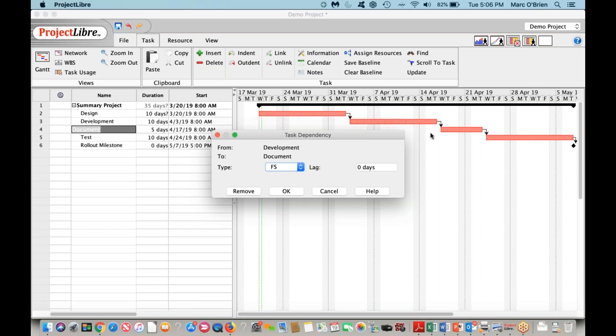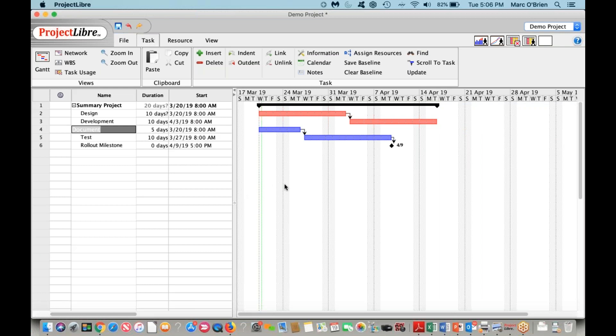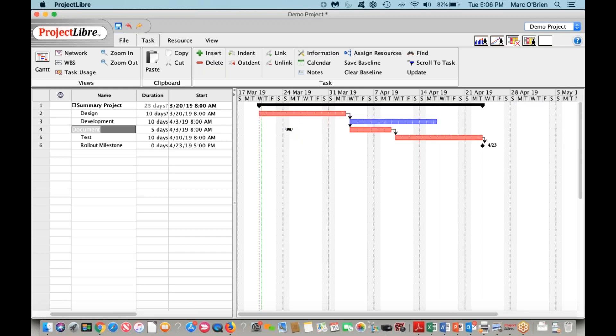What I'm going to do here is remove this link, and you can see the project change. What I'm going to say is design is a predecessor. If I click in that bar and right-click and then drag to document, you can see that I'm setting up that relationship. Now documentation and development are occurring in parallel.